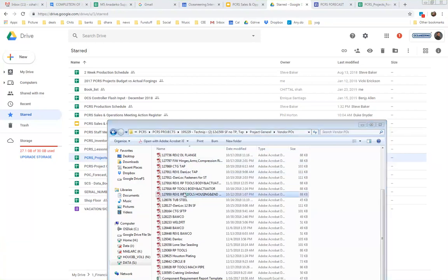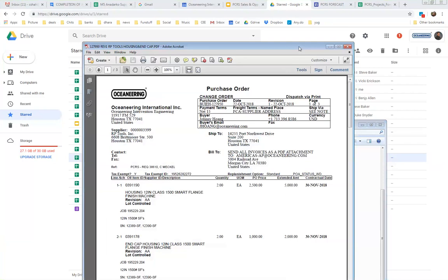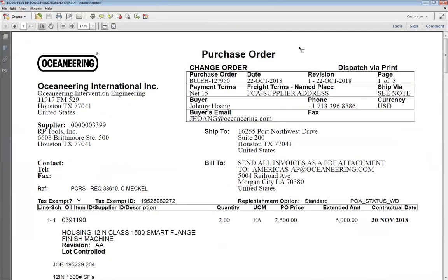On the PCs, do they have to provide a minimum of 2 quotes to the PM? So we try for 3. We cannot achieve it all the time. 3 is what we want. 2 is where they usually end up because there's no third person who can do this, or we just know it's not their wheelhouse, even though they will say yes they can do it. Either their lead times are higher or their costs are higher, so you might not even spend time. I want to change that, but we normally end up with 2 rather than 3.